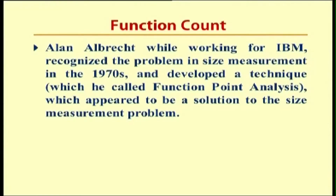One effective measure for projecting cost is the function count methodology. We estimate using function count, focusing on what kind of functionality is involved for studying cost. Alan Albert, while working with IBM, recognized the problem in size measurement in the 1970s and developed a technique called function point analysis, which appeared to be a solution to the size measurement problem.